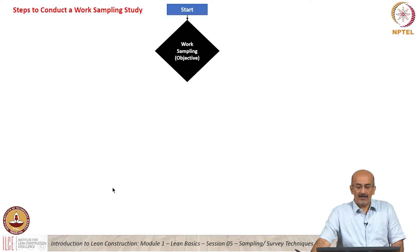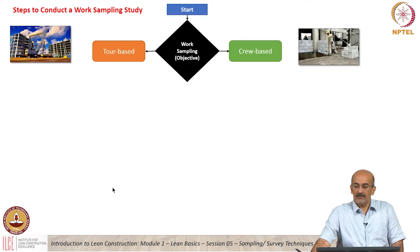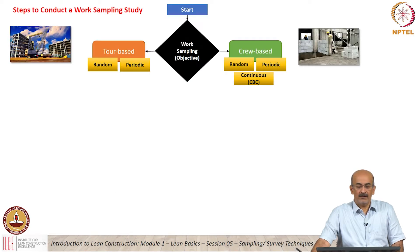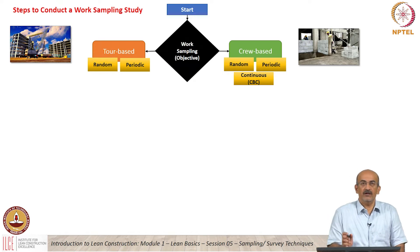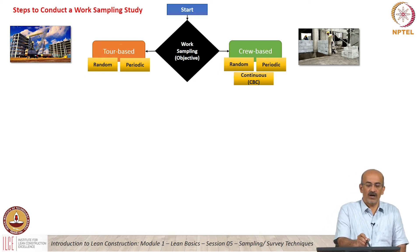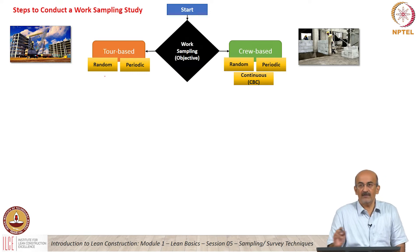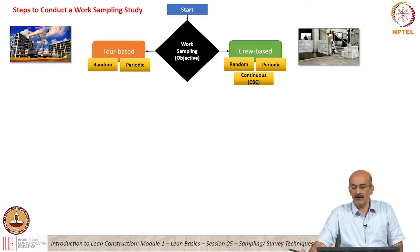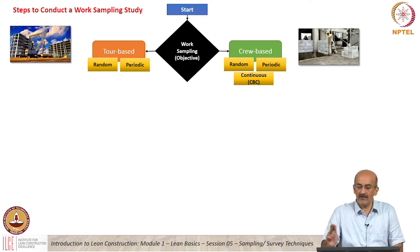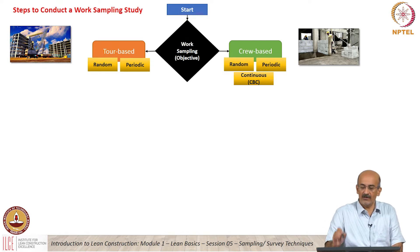If you look at the steps to conduct a work sampling study, again many of these terms are now familiar to you. I have a tour-based approach and a crew-based approach. In the tour-based approach I have the random or the periodic; in the crew-based I have random, periodic, or continuous — though continuous is only for illustration in this case.